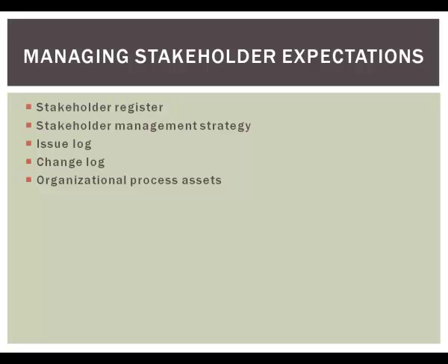Now, the issue log and the change log, these are two documents that you'll use throughout the project, but in light of stakeholder expectations, the issue log will document when there are disagreements or misunderstandings and what the outcomes of those issues were. And then the change log, when a stakeholder asks for a change request, that's always recorded in the change log. That way, when you get to scope verification, the stakeholder can see that the change was requested and here's how it was implemented, and there's no discrepancies later in the project.